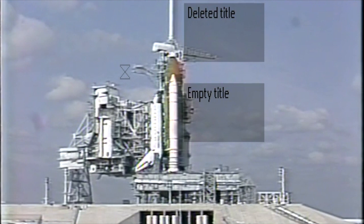This is shuttle launch control at T-minus 29 minutes and counting. Counting now down to a hold at the T-minus 20 minute mark. That hold will last for 10 minutes. It's a planned built-in hold and it's standard in a shuttle countdown.